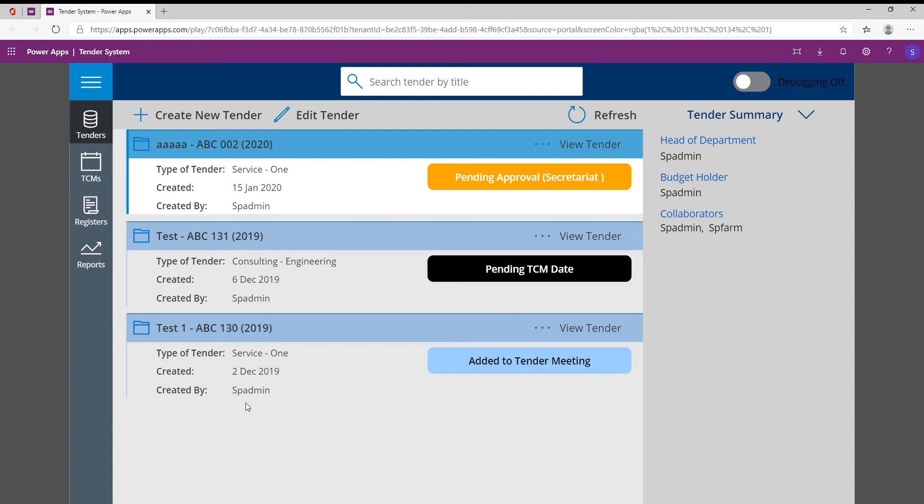And then this is quite a rigorous process in the back end business process that it needs to follow. So the project manager needs to set up the tender, then they need to collaborate on that tender, it needs to be approved by the head of department. Once it's approved by the head of department, the secretariat needs to approve it, then needs to go back to the head of department to get a signature and then needs to go back to the secretariat, and then only then can it be added to the tender committee meeting.